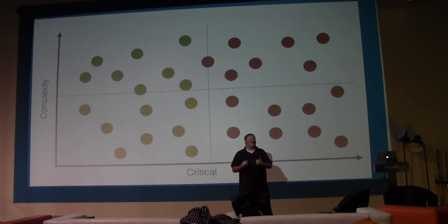And so it can be hard for us as engineers, because sometimes we'll logically think, well, this is how the flow of the application goes, so I'm going to start building it that way. Instead of saying, no, what are the most important things? Because I can't do all 10 things. I want to be able to do 5 things that I know can work together and I can ship, instead of the first 5 things I can't launch because, you know, I can't take people's money.